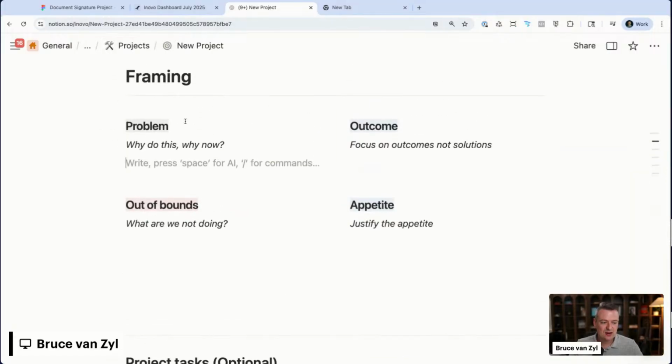That's typically where we will get final sign off from the two sides. Think of this like there are two sides to this. We have developers who are agreeing to, let's say, 2 weeks for this project, and we also have a client who's agreeing to pay for 2 weeks. So we all know what 2 weeks costs in dollars. We know what it is in hours. We know what it is in terms of a timeline.